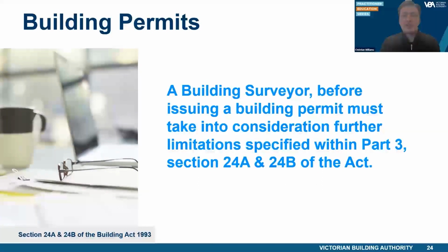The building surveyor must not issue a building permit in relation to building work unless they are satisfied that the requirements of Section 24A are met, in that the building work is to be carried out by a builder who is specified under Section 24B. The builder is named in the building permit.